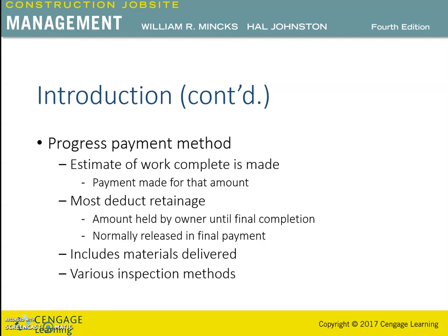Also, various methods of inspection and verification are done by the owner to determine accuracy of the payment request. So this verification process can vary from a meticulous measurement of work in place and material stored to an approximation of the percentage completed for the activities. So owners and their agents such as architects, engineers and construction managers are concerned that proper amount be paid without overpayment.